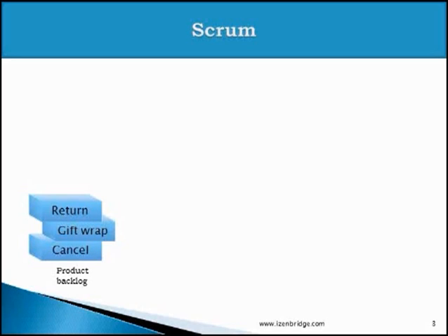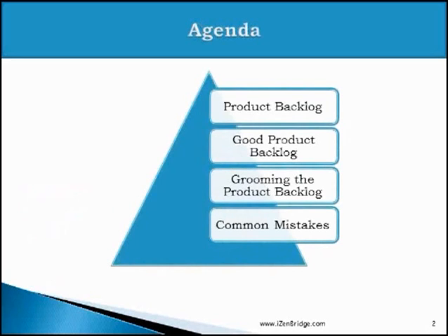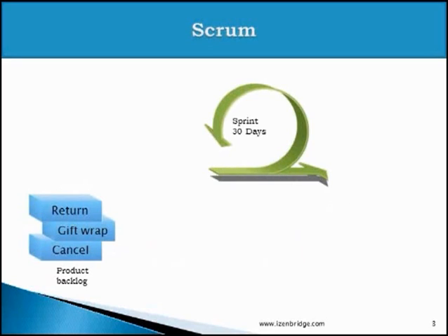In a Scrum project, at the beginning, we have a product backlog, and then we have a fixed sprint duration. So we say that these are the 20 items which the team should be working on during this particular project, and this is your sprint duration. So you should be working in cycles of 2 weeks, 3 weeks or 4 weeks. Maximum duration which is allowed in Scrum is 30 days. So we decide that this is your sprint duration, this is your iteration duration, and this is your work. This starts the Scrum project.